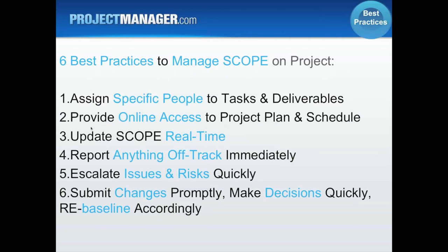So when we talk about scope, we feel strongly that you have to assign specific people to the tasks and deliverables. If you remember the deliverables diagram early on that showed all of the scope, the deliverables being produced, when you're managing your project as a project manager, you're managing the scope. You want someone specific to be able to go to for the tasks and deliverables being produced, because again, remember, you're constantly monitoring and asking, is the scope or the deliverable being produced in the original scope? If it is, does it meet the specs? If it's not in the original scope, why in the world did we produce it anyway, and what effects is it going to have on our project? So you want specific people to go to and ask those questions, not an organization. An organization, no one will. Selective amnesia quickly sits in when you start trying to find someone in a, quote, organization. They all of a sudden have no knowledge.